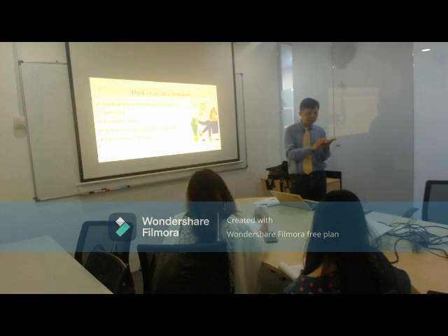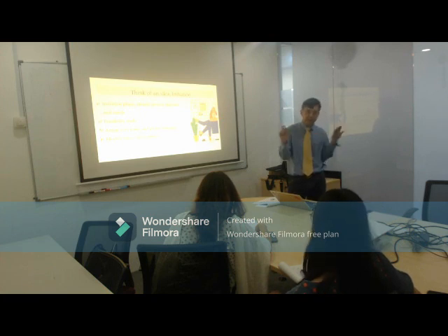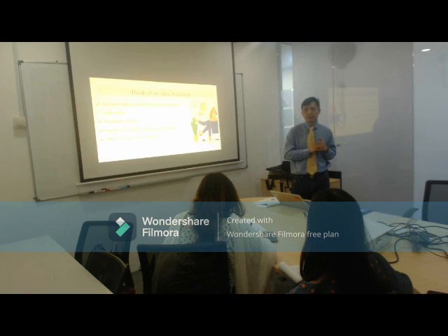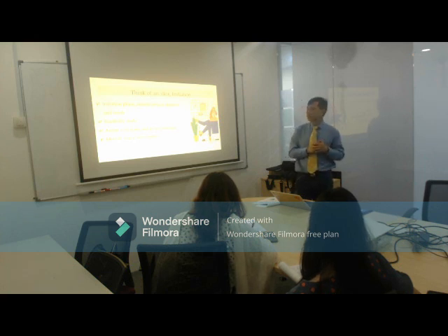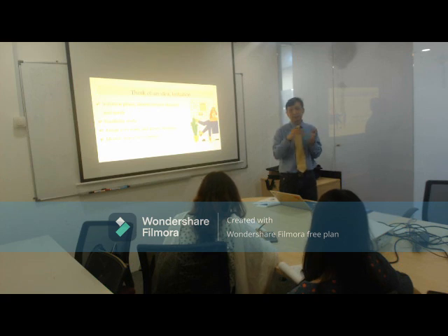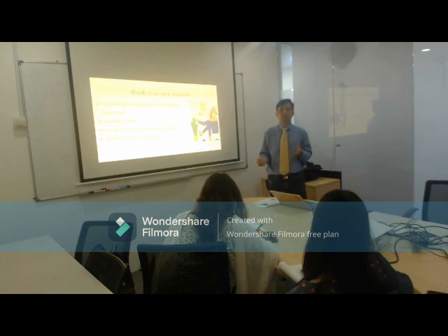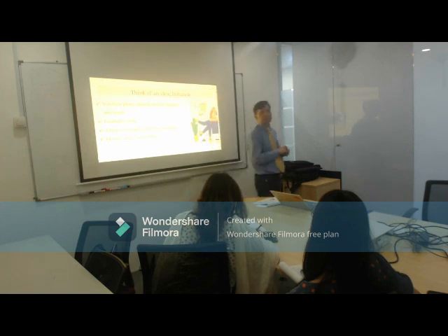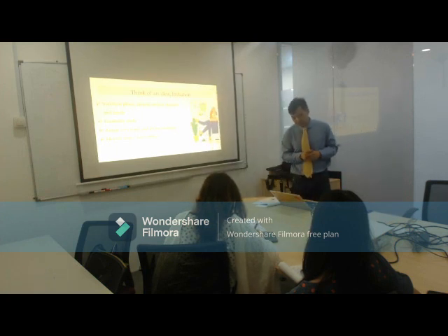Which means they have decided on that, they recorded it in the meeting minutes, and somebody will create something called a PIN, Project Initiation Note. They will say who wants this, what the major deliverables are, who is going to be the project manager, and who the core team is. They will mention all that inside the PIN, because that's the official document. Then they send it to the management. The management is the one who will sign to say yes, we start, and yes, they agree that he will be project manager and he will be the core team. So that's how they start the project.